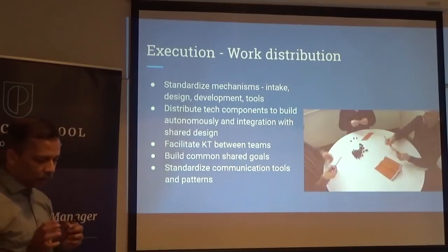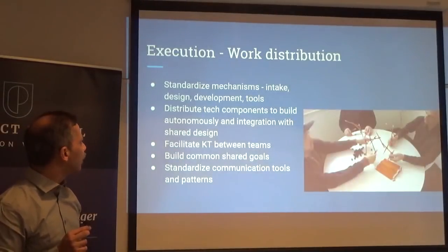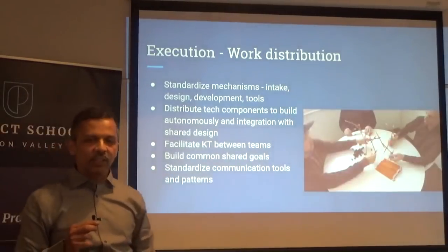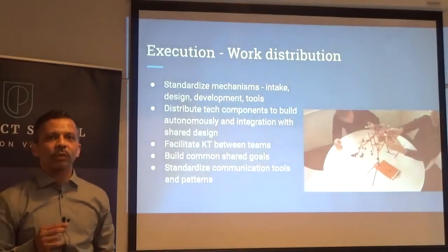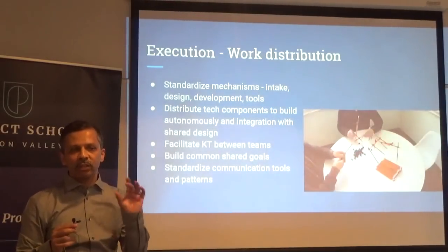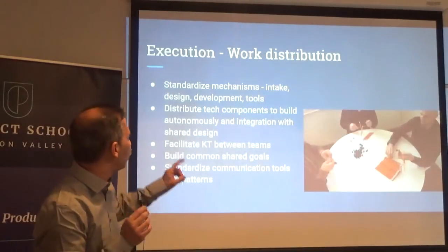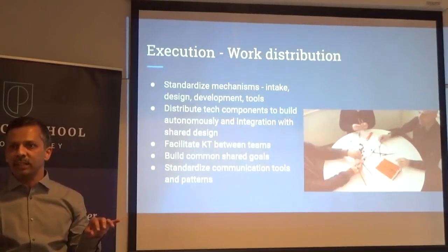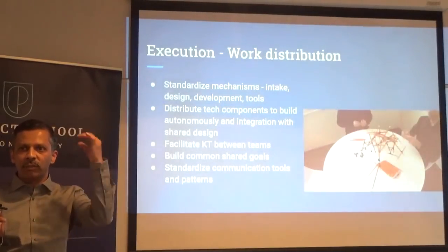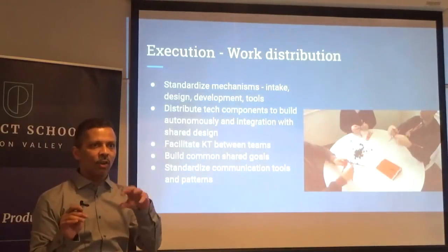Now, when I was at one of the consulting companies, how did we work with global teams? We designed things together. We used agile methodology. We would have a planning sprint, and in the planning sprint, we would also do an architecture sprint. So you design things together, and then you split them into components that can be autonomously developed. Each team gets their own component to work on, whether it's the front end, the middle tier orchestration layer, or the data tier or data analytics.